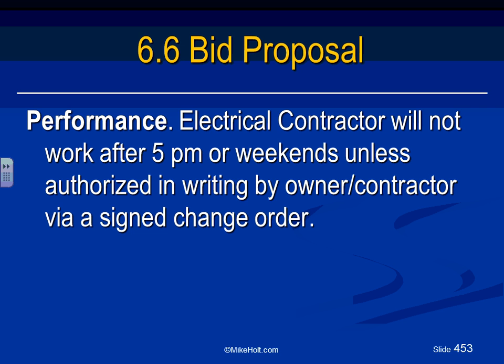Okay, performance. Electrical contractor will not work after 5 p.m. or weekends unless authorized in writing by the owner or contractor via signed change order. Do you know, guys, we don't want you to work weekends and after 5 p.m.? You have to pay double time for people to work on weekends or after 5 p.m. So who's going to eat this?